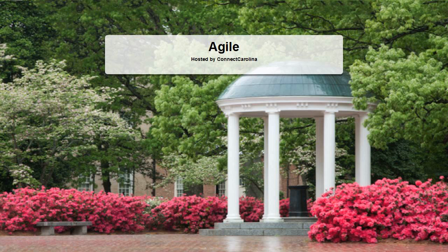And then things get done, this is sort of the cycle, and they go into this queue, if you will, up here, things that are release ready. And if it's a project, it may mean there's a bunch of stuff that has been individually developed and unit tested and tested functionally as it stands, but it was only part of a bigger thing. And so when we're ready to deploy it, we still have to do the integration test. And that would happen up here before it actually gets released into the production environment.